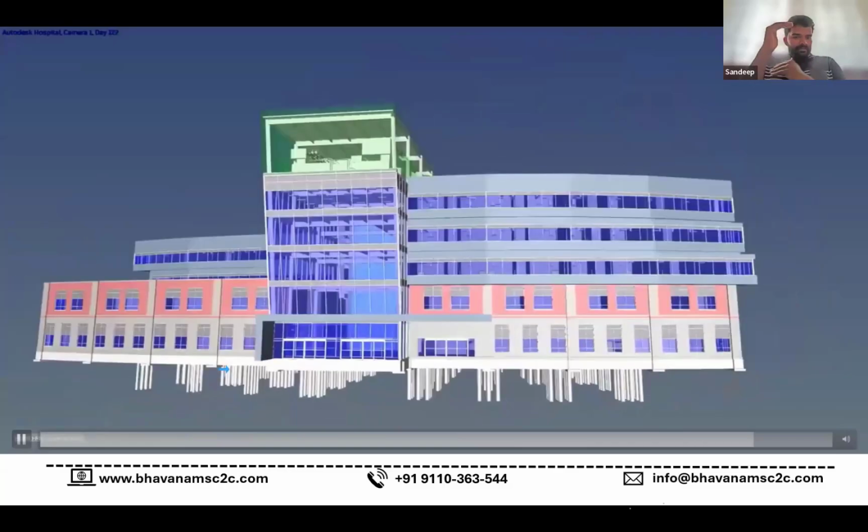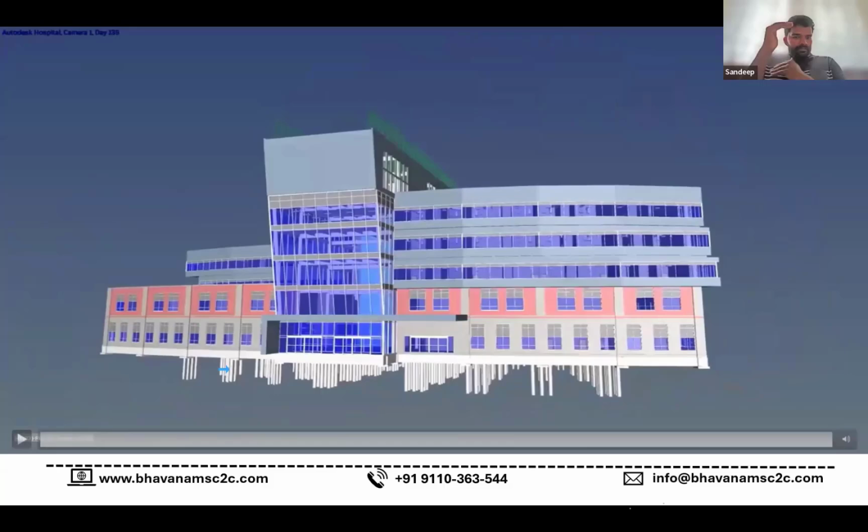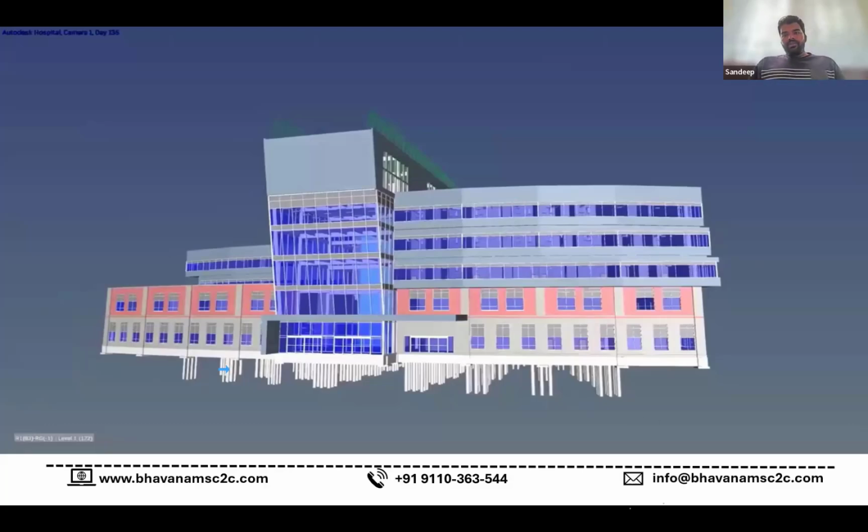This helps in detecting clashes. When the simulation is going on, when the video is playing, we can detect some of the clashes at an early stage itself. By resolving those clashes before they reach the site, definitely it is going to save a lot of time and cost of the project, right? So that is where Navisworks will be very useful, basically for coordination purposes. The next one is the communication purpose.